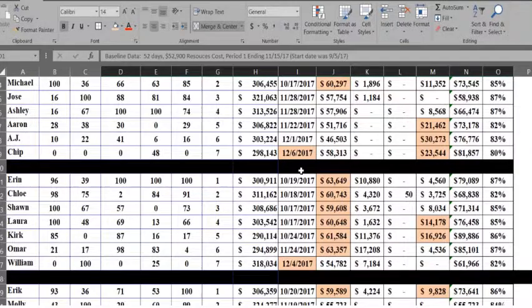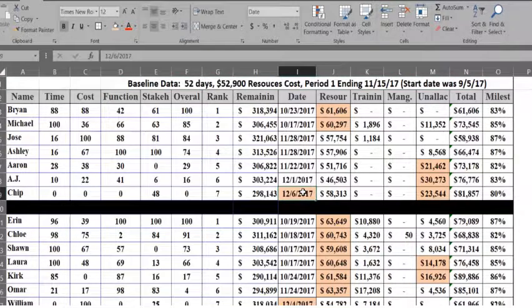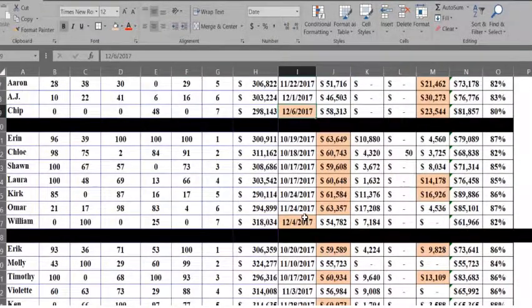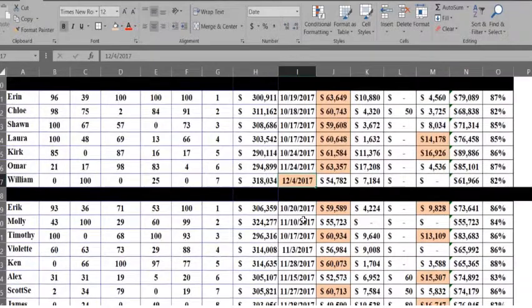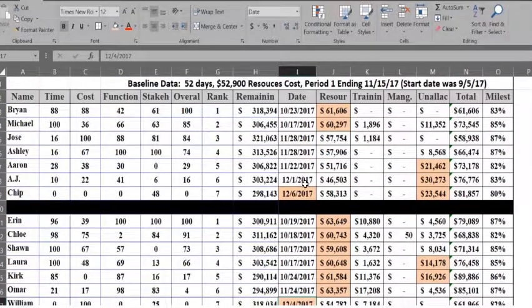And so the only thing I'm thinking is maybe those with a little bit later dates didn't 100% resource all tasks. Again, if you don't 100% resource every task, tasks will take longer in calendar days. They won't cost you anymore, they'll just take longer. So I don't know if that's happening here with Chips and Williams, or if possibly you just didn't have the right resources assigned. And then the last thing we'll look at are resource costs.